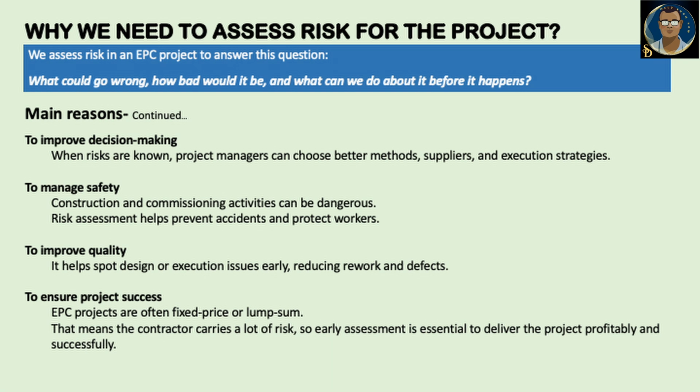For our project, this is quarterly. Every 3 months we have one risk assessment session based on the stage of the project, so that we are already ready for any kind of negativity coming to the project. To improve quality, it helps to spot design execution issues early, reducing rework and defects.